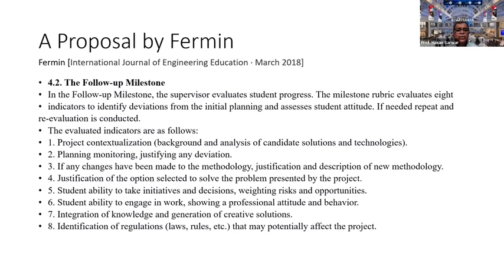Then the follow-up milestone. Here, the supervisor takes the lead and evaluates the student's progress, and the milestone rubric evaluates 8 indicators to identify deviations from the initial planning done in the initial milestone and assesses student attitude. If needed, repeat and re-evaluation is conducted.